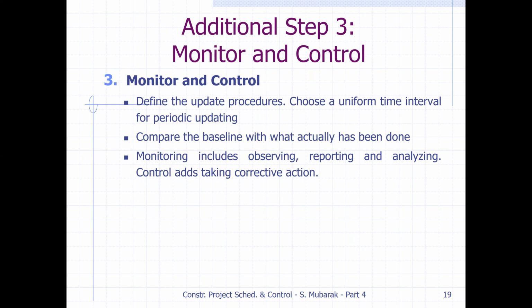Monitoring means you are observing, reporting and analyzing. But control adds taking corrective action. Under control, you have to bring the schedule back on track. Whatever is behind schedule, increase some resources and try to complete it on time. So then control the schedule, otherwise your project will get delayed.